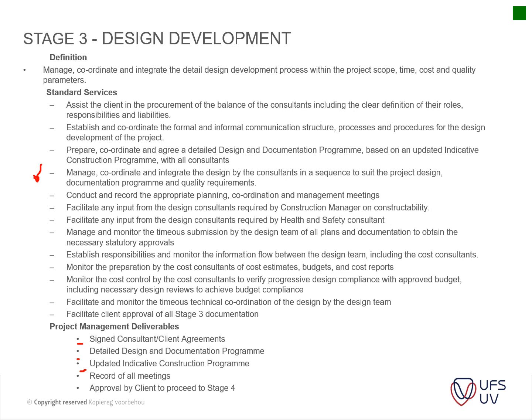But you will not go into details of, okay, now we're doing the strip footing, and now you have to wait 7 days, and now you have to pour the concrete and build up your foundation walls, etc. It still is divided into elements and not really items as such.